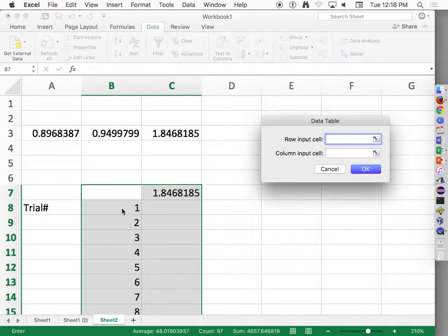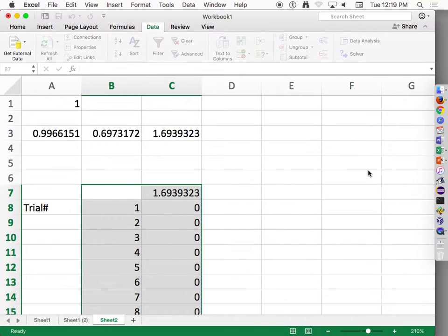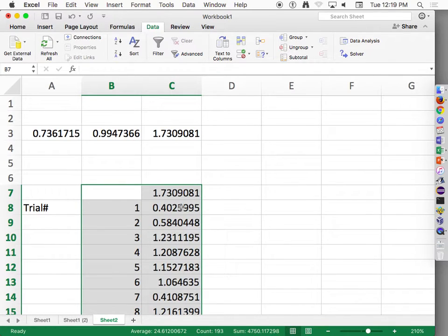So now I want it to pick up the 1, put it somewhere, recalculate the spreadsheet, and then record this number. Pick up the 2, put it somewhere, recalculate the spreadsheet, look at this number, record it there. But it turns out I'm not going to use these numbers anywhere, right? So I can click on any cell in the sheet, probably other than these. Like I could just have it put numbers there, and every time it puts something there, it'll recalculate the randomness. So there it's done 96 random trials.